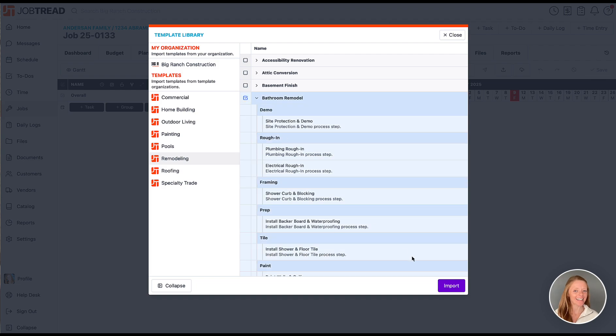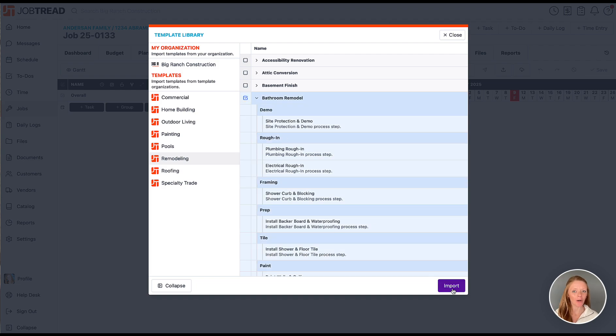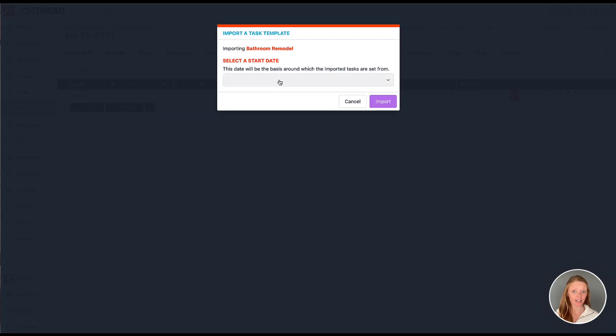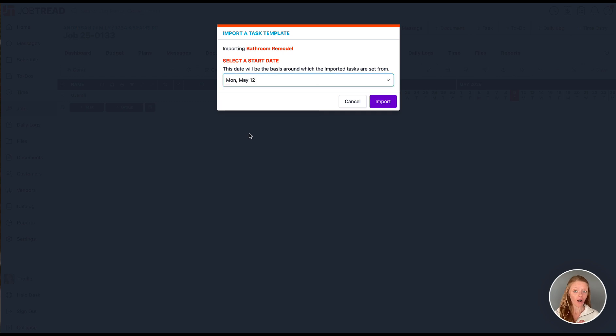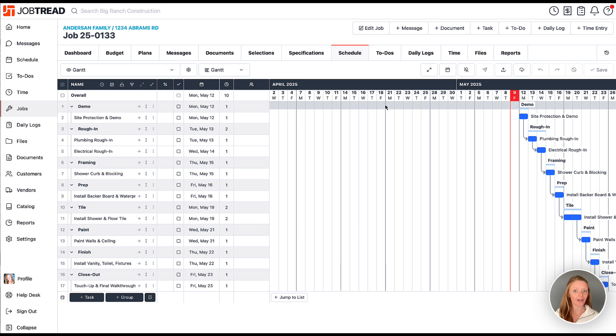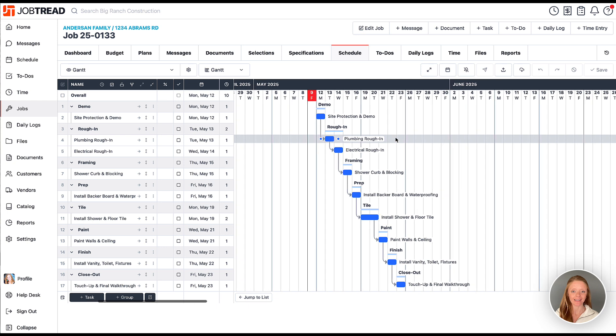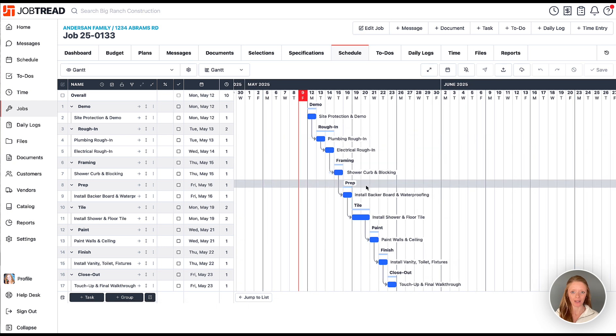When adding a template to a job, we will also be prompted to select the start date for the template. This will be day one for the first task, and all other tasks will be scheduled according to the duration saved in the template.